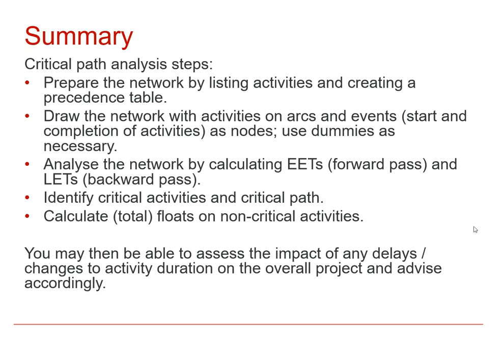What we'll then get onto is the idea that we can assess what impact delays might have. So if it's in the critical event, if that gets delayed, it will delay the overall project, but other activities, if there's some float, a delay in one of those might not affect the overall project, and we might actually choose sometimes to delay an activity that has some float in order to make better use of the resources that are available for the project.